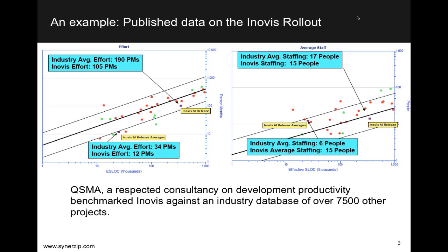We benchmarked a couple of releases here. You can see one in terms of thousands of lines of code, up in the hundreds of thousands of lines of code, which is a pretty typical large-scale initiative. We were able to almost cut in half the person months required for those sorts of initiatives, and for the sort of the Agile sweet spot, or those very small, rapid responses to the market, we were able to get an almost 2/3 reduction in the total person months required to deliver successfully.